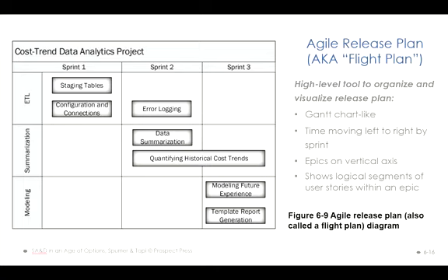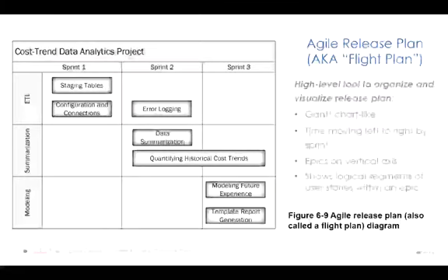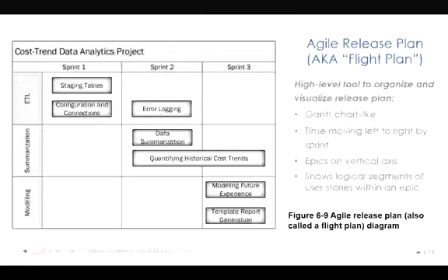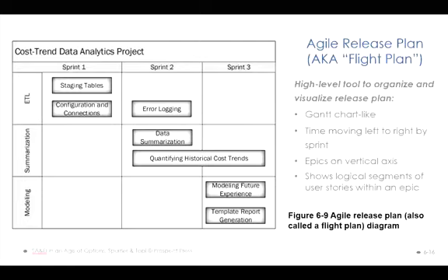And you have the tasks to be performed on one hand in a reasonable hierarchical format. In this case, it's a data analytic project. You have to prepare the data first, which is called the ETL process, and then you have to perform analysis and summarizing functions to calculate and discover information from your data. And finally, you build charts and build models to explain or predict future performance. There is a precedence relationship between these three jobs.